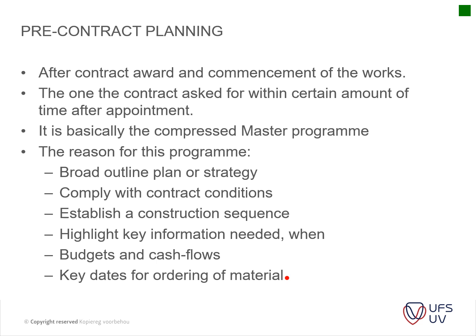Just to comply with contract conditions, for instance, within the GCC contract, it's default that you have to supply a resource-based program, whereas the JBCC doesn't specify how your program should look. It just specifies that you have to have a program by your site handover.